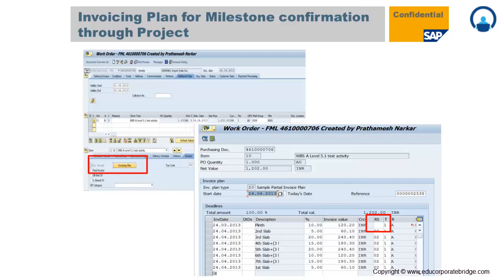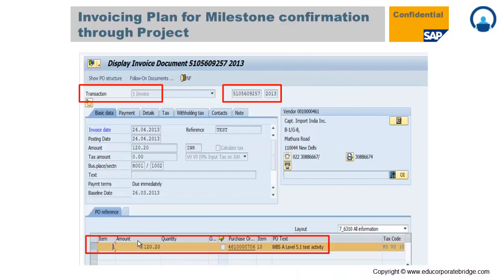Once that particular milestone is confirmed, the system automatically removes the block from the work order. As shown here, once the first milestone is confirmed, the block is removed and the work order is ready for invoicing. The system will then allow raising an invoice for only that milestone amount against that particular work order. This is the invoicing plan from milestone confirmation through the Project System module.